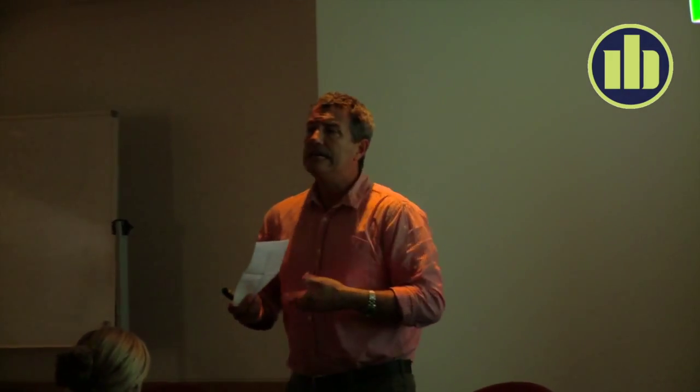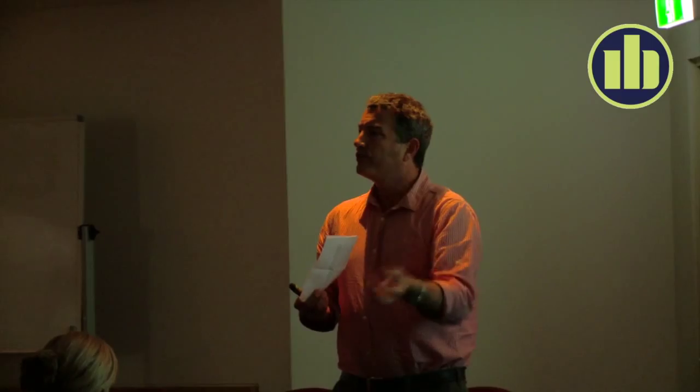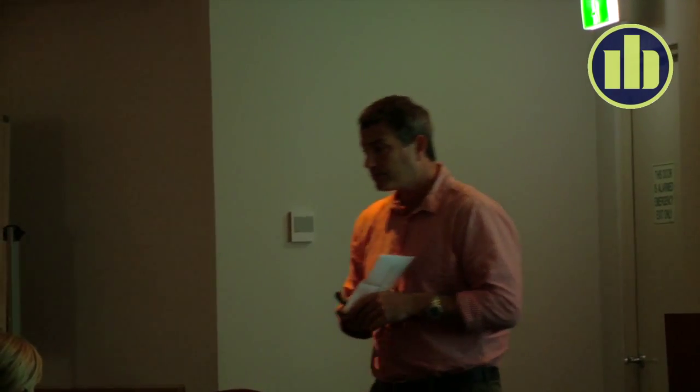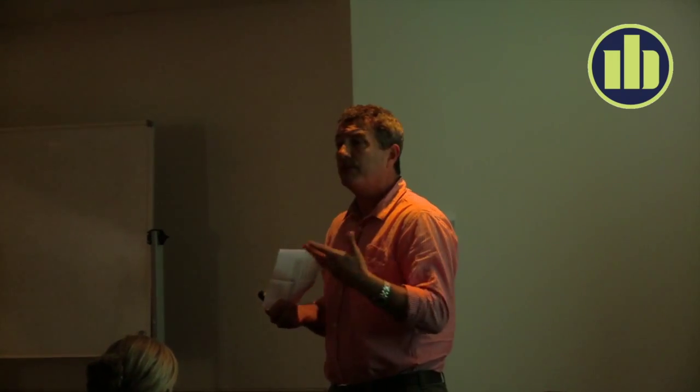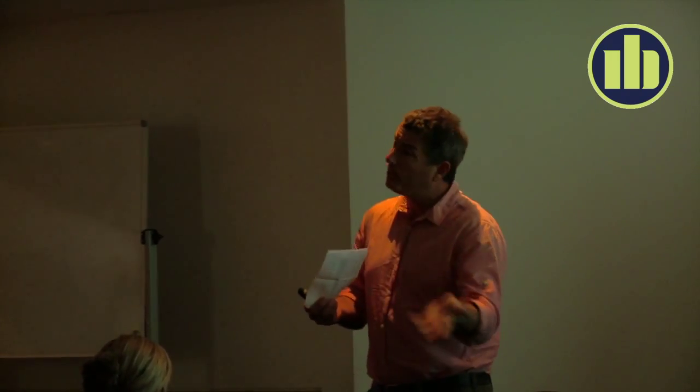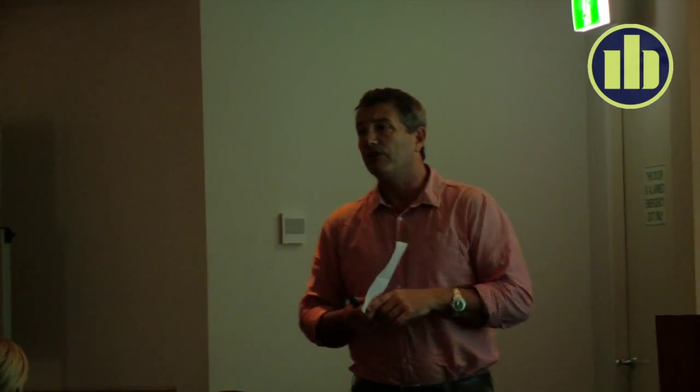So what I think is an alternative and a better approach is to have a 5DQS or an estimator, whatever you want to call him, be able to pull information from the model at the time that he needs it and then push back data at the right time for the design team and owners to be able to receive that information. A process like that means that designs can be tested, the efficiency of the design can be tested in the very early phases before models have started, and that's when we have the best opportunity to influence cost. Once things are fully designed, it's very, very difficult.